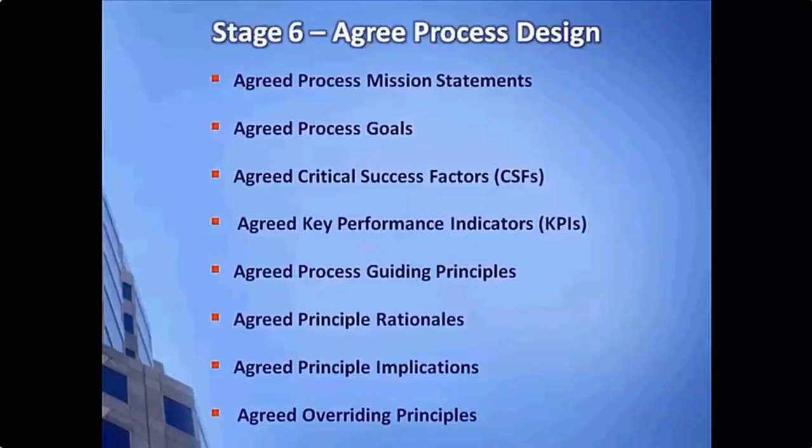Here you're laying out the process in detail, and you're basically reviewing these with your key stakeholders in terms of agreement and whether these approaches make sense. At the end of this stage, these types of decisions that you've already made for your future state process design will be frozen for the remainder of the implementation effort, only to change if testing or other factors prove that these will not work for one reason or another.